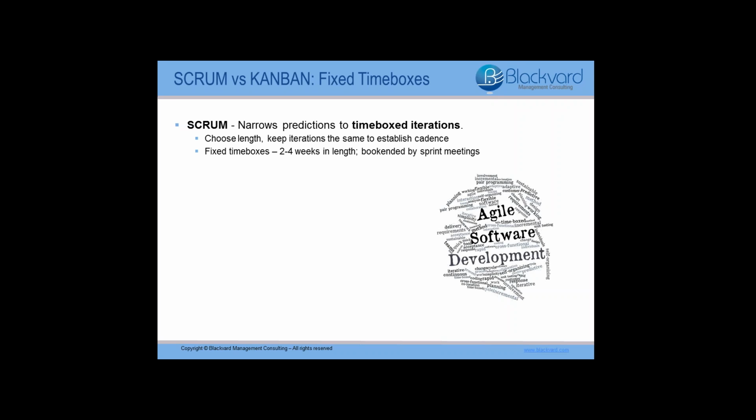So let's talk about these iterations for just a few moments. And let's start with the beginning of the iteration. At the beginning, an iteration plan is created. So the team pulls out a specific number of items from the product backlog based on the product owner's priorities, and how much the team thinks they can complete in one iteration is then determined.